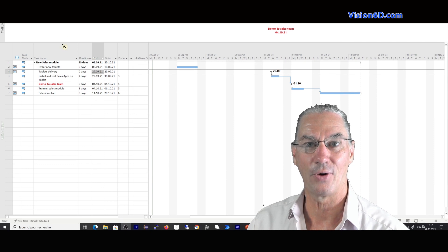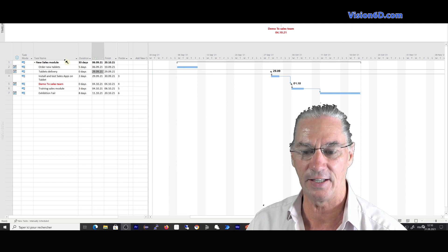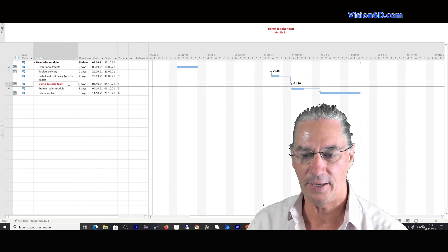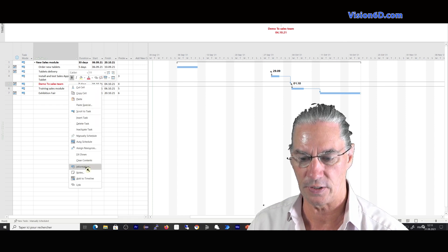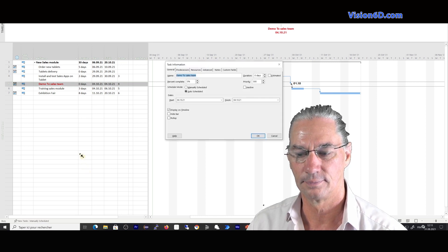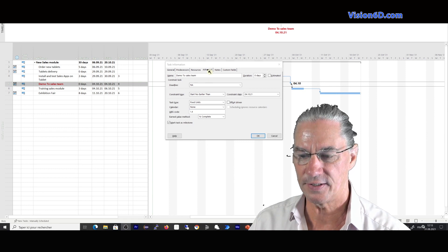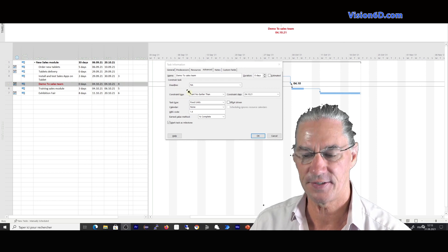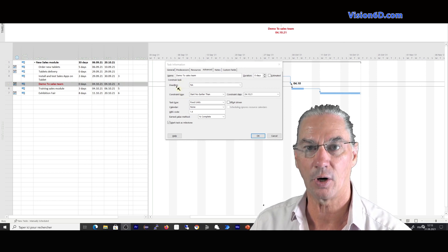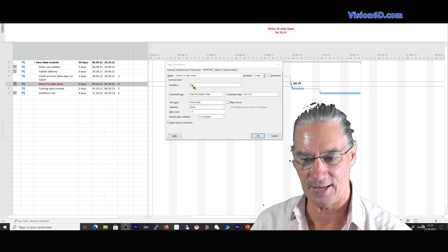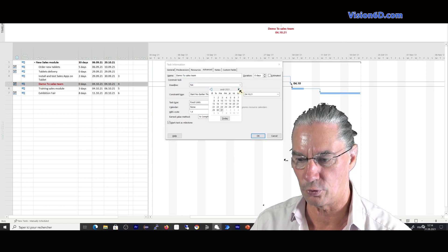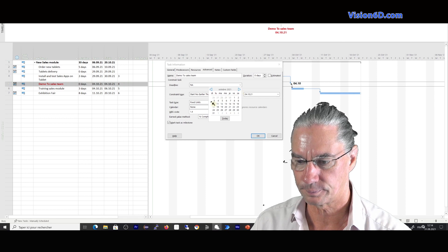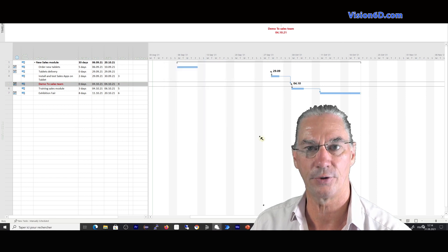There is now another way to insert deadlines. You don't need to have the deadline column. For that, you select the task and you go into the information of the task. You can simply double click on the task. Into the advanced part, we go to the constraint on the task section and we see that there is a part entitled deadline. Actually, I haven't any deadline set and I will here now set the deadline to the 4th of October. Very that way. Simple. I say OK.